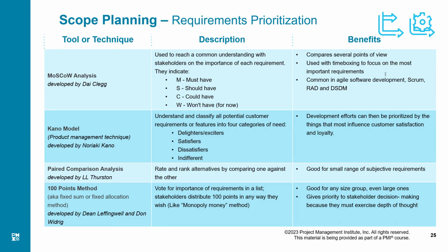And if we have done all the delighters and satisfiers, then there are certain items which are dissatisfiers. I can address them in the third category. And then those requirements about which the stakeholder or customer may not have any negative or positive opinion, these are my last priority. Probably they will never be done, but if at all they are done, that is because we are still left with the time.